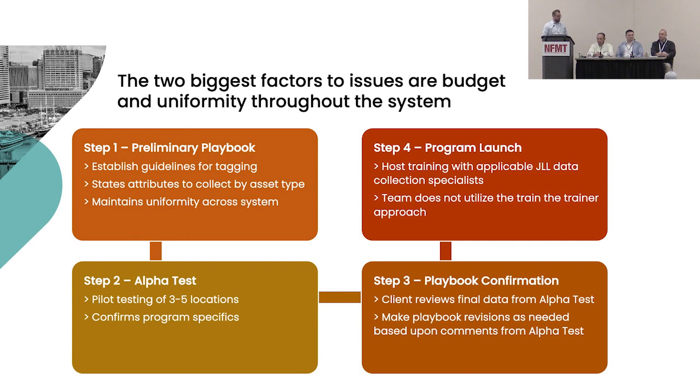We do this every day. Do they know how to collect this, how the data is going to be used? I don't know how many people in the room can raise their hand and say, yes, our on-site managers all know all that data. We haven't come across any. But what we have come across is clients that go down the path and say, we're going to use our on-site managers to collect data, and we're going to force them to do it. It's not part of their day job, but they're going to figure it out. That data comes back, it's about 50 to 60% accurate.